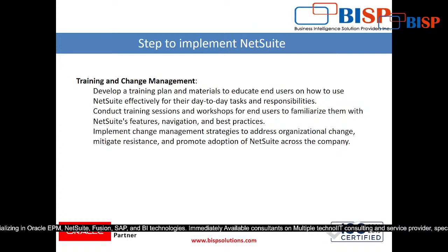Now what is a change management document? At the initial level, whatever the requirements are, they are written in the BRD. But during the projects, many times, almost every time, the client demands some more changes, and you can't deny the client. But this will take time, resources, and of course extra time, extra billing.